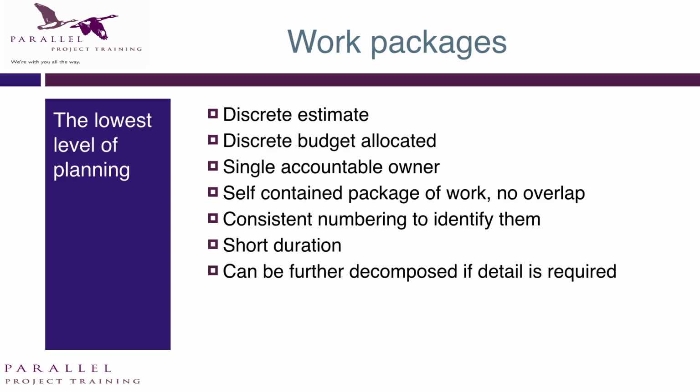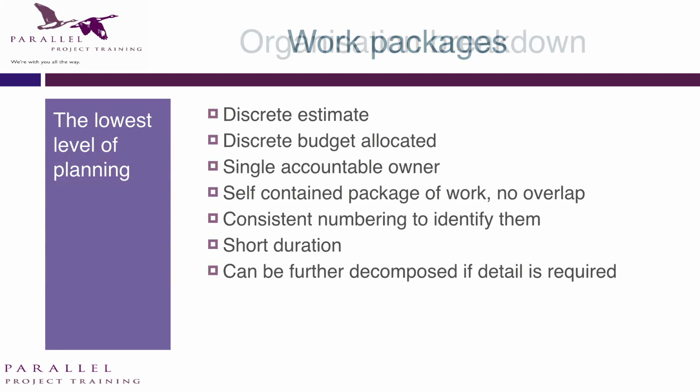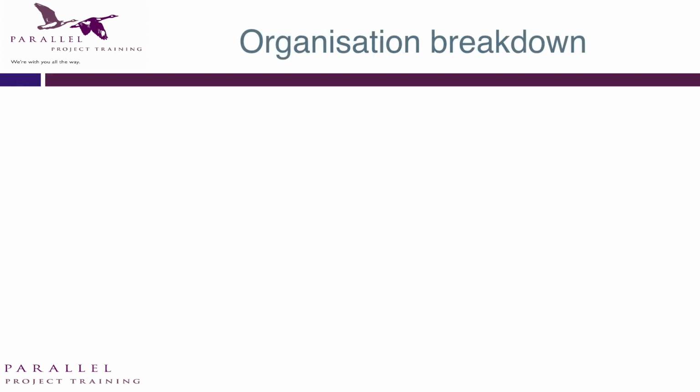And sometimes that work package becomes a statement of work for a contract. So that work package is then subcontracted out to a provider who's going to do that work. And we might decompose it into further detail as part of the planning process.